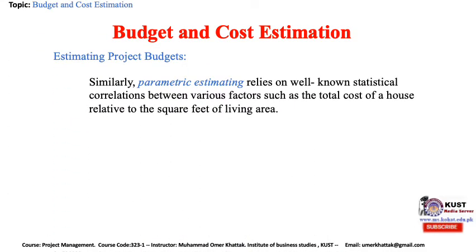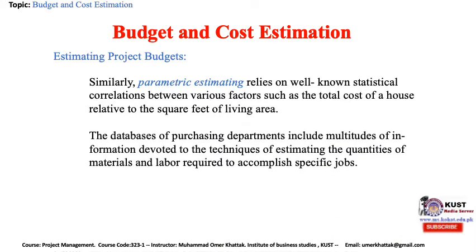Similarly, parametric estimation relies on a well-known statistical correlation between various factors, such as the total cost of a house relative to the square feet of living area. The databases of purchasing departments include multitudes of information devoted to the techniques of estimation — estimating the quantities of materials and labor required to accomplish specific jobs.